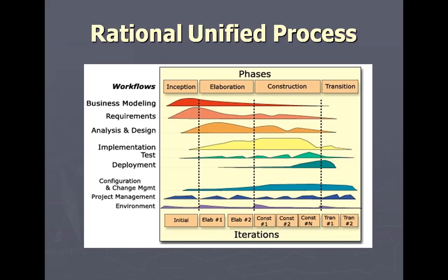It is a system development process which is serial in the large and iterative in the small, delivering incremental releases over time. While following proven best practices, it consists of 4 phases: inception, elaboration, construction, and transition, which execute sequentially. Work is grouped into logical activities called disciplines, which are performed iteratively throughout the 4 phases. The RUP is not only a system development process, but also a system development process framework that can be tailored to meet an organization's individual needs.